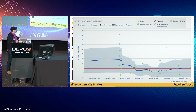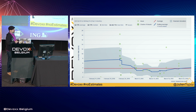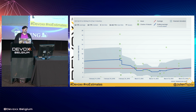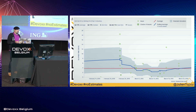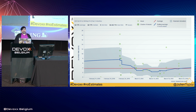With the red line, you can see the average cycle time value of a team in a 3-month period — around 4 days and 17 hours. Being predictable is exactly like training for a race. If you want to do a 10-kilometer race in one hour, you have to maintain an average speed of 10 kilometers per hour. You can be a bit faster sometimes, a bit slower sometimes, but you have to maintain that average speed globally to be predictable.